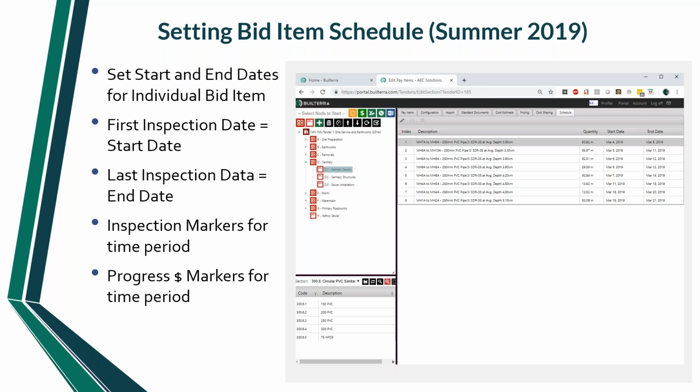The other thing we're looking to do is exporting. The idea here is that the minute you start doing the inspections, that must be your start date. So it'll automatically start registering the start date as an actual start date versus your proposed start date. And then you'll have an end date, which would be your last inspection. So the Gantt chart that we're all used to seeing would be fully automatic as far as actual starts and ends. You don't have to do that manually.